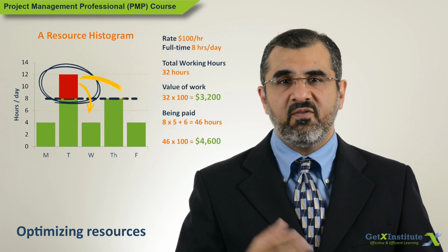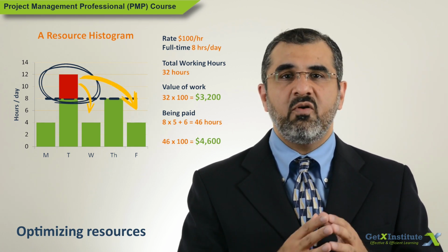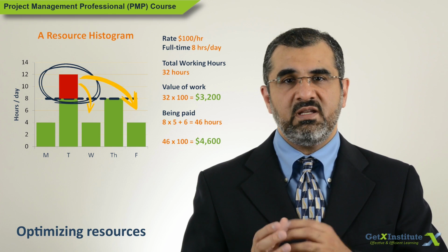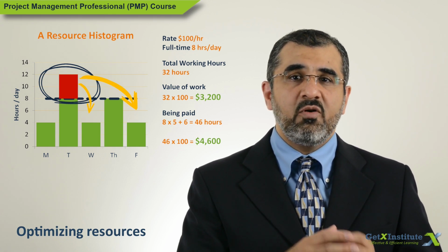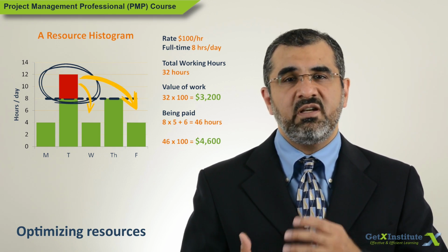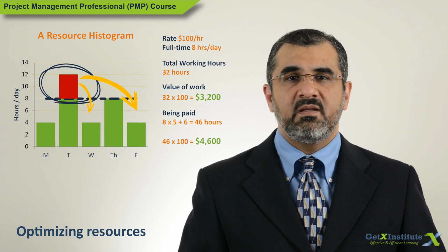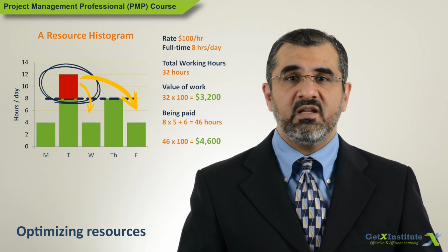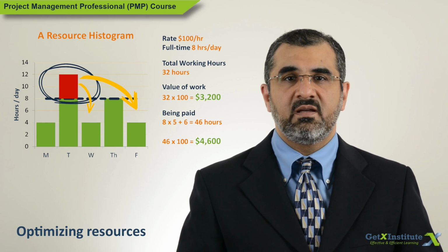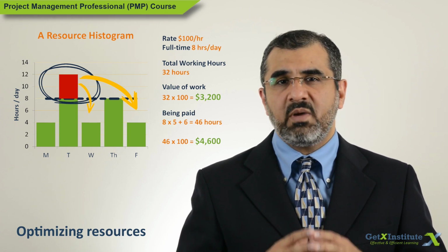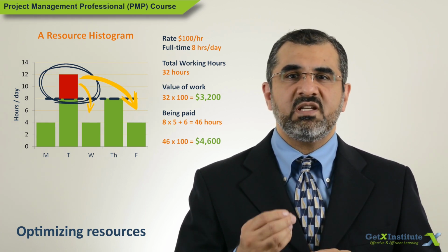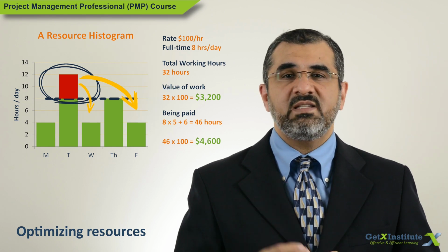Usually the available float is first used to move over-allocated work as shown in the diagram, and then some more adjustment be made to the critical path. The impact can be that the critical path changes. It is not that the critical path will change, just that the project manager is willing to accept a change to the critical path.